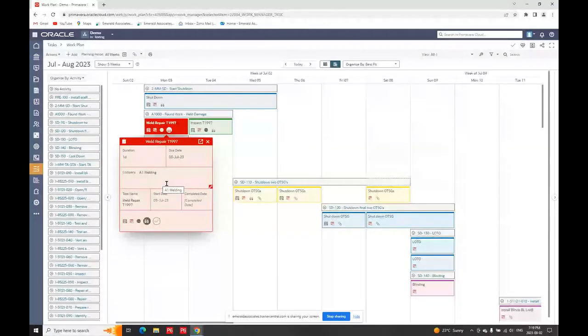And as I mentioned, there is a lot of times when you've got an activity that goes to the field and you might think, okay, I'm tracking this one activity. Well, at site, they may not be tracking one activity. They might have 3 or 4 tasks, because it might be something that they require their own resources and a couple subcontractors to finish it.